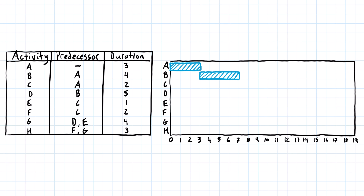Moving on to activity C — it also depends on activity A, so it can't start until activity A finishes, and it has a duration of two days. We come to where activity A finishes and follow that down to activity C. We go over one and two. Next is activity D: it can't start until activity B is finished, and it's five days long. Activity B finishes at the end of the seventh day, so activity D starts there — technically the beginning of the eighth day — and we come over one, two, three, four, five days.